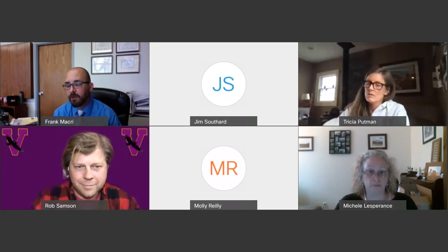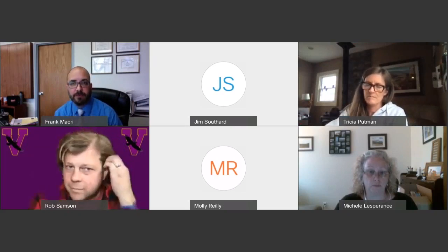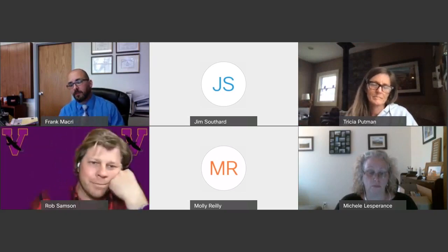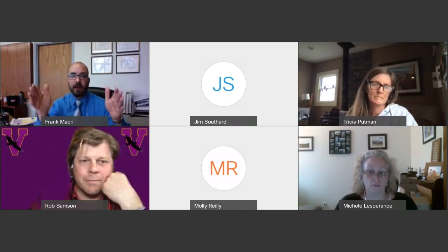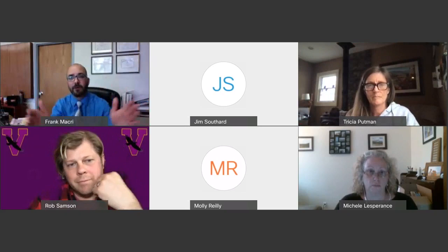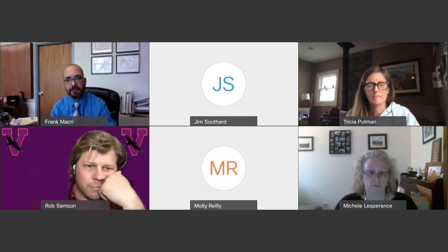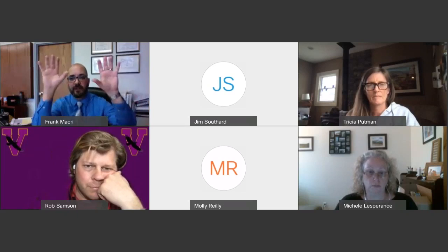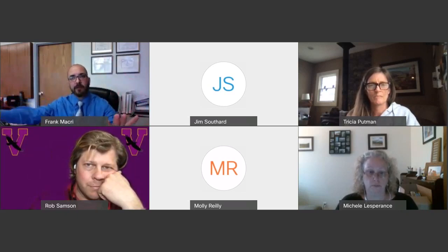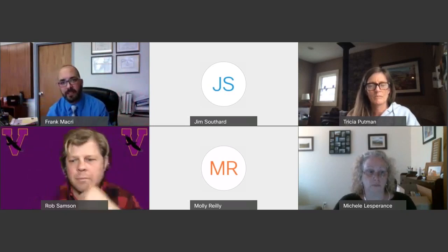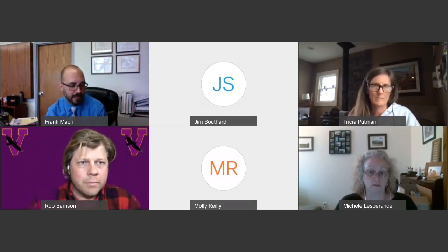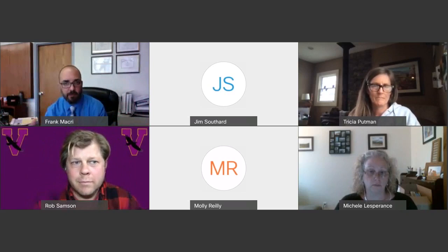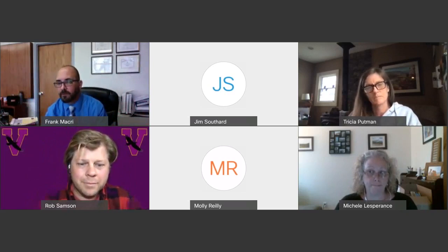My one suggestion is if we use that satellite field, not to do it the way that was originally planned. The way that was originally planned is you would go around and you go down and you go in and you go back further. I actually said maximize where we are and use it right when you go in. So as you walk into that satellite field, you build your transportation station there. So then you have the remainder of all that green space and all that area. You're lessening your infrastructure, and your costs will go down, and you'll be able to maximize all your spacing.